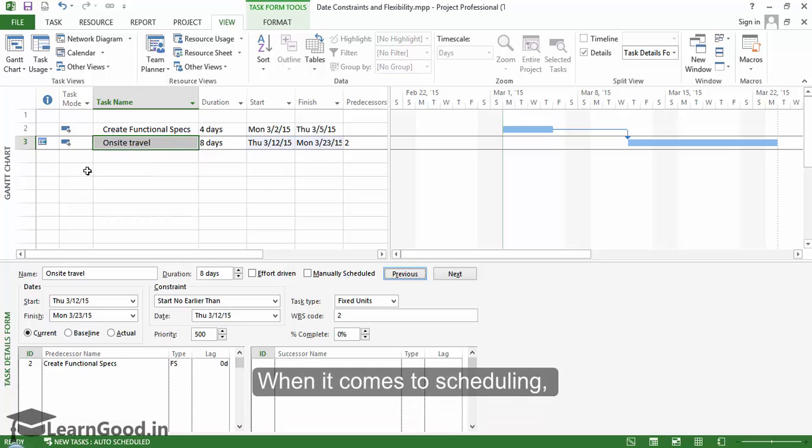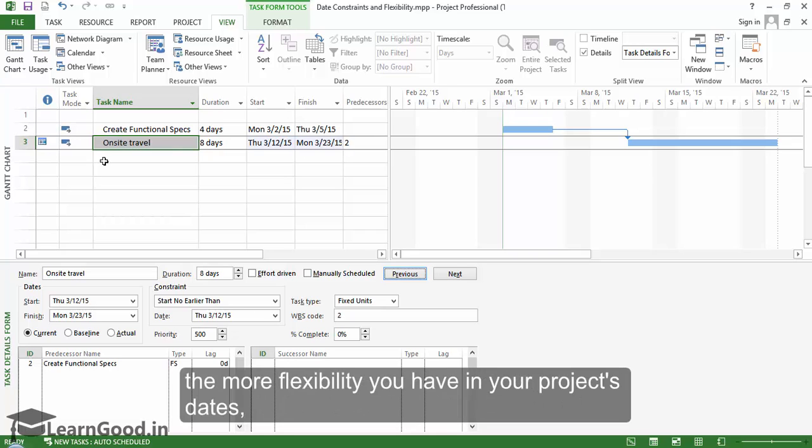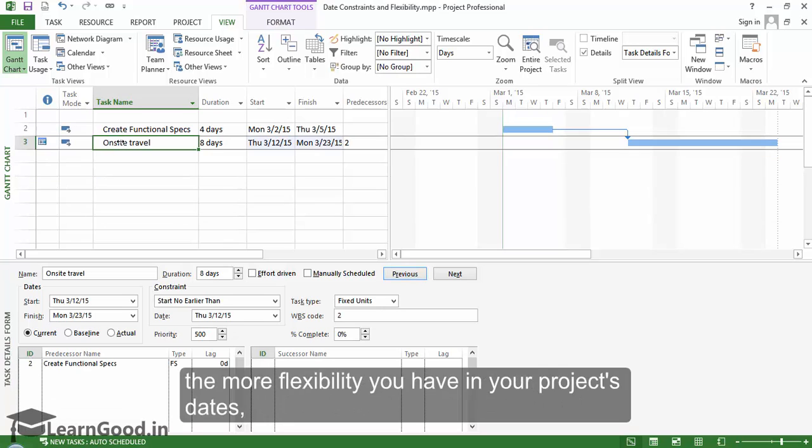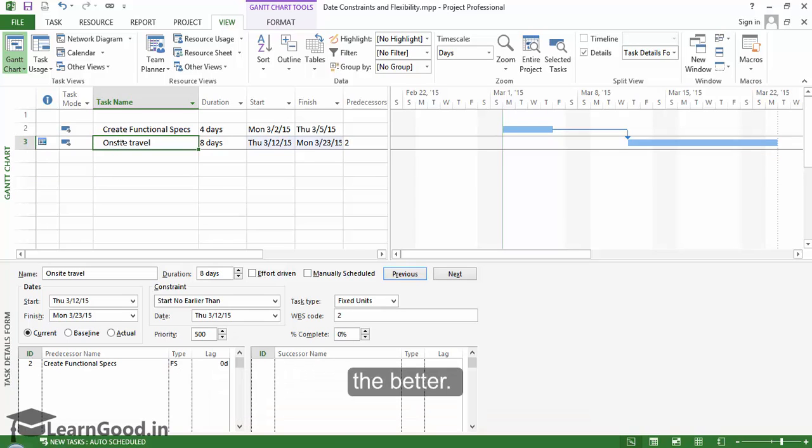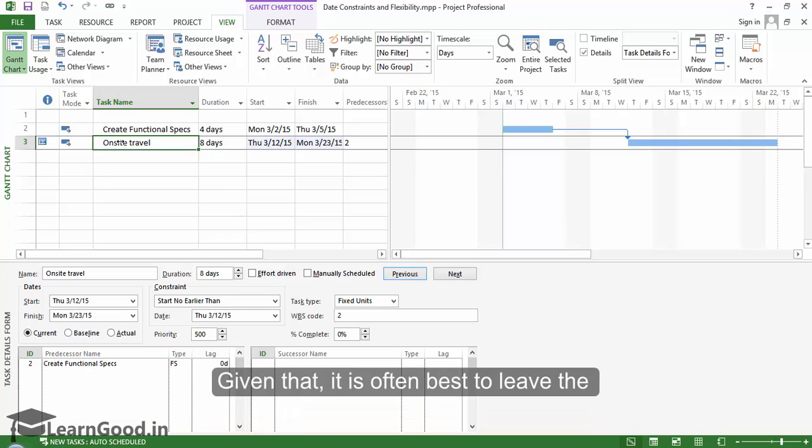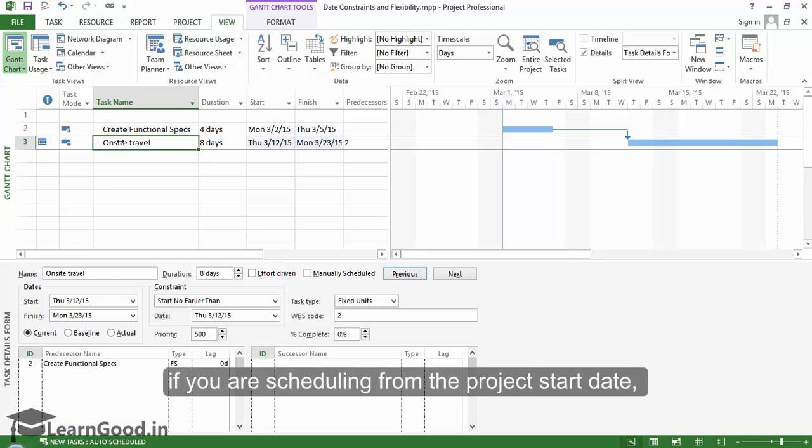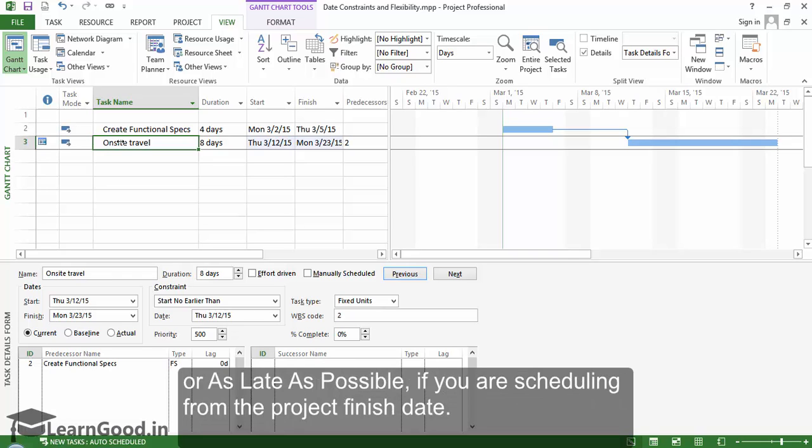When it comes to scheduling, the more flexibility you have in your project's dates, the better. Given that, it is often best to leave the constraints set to as soon as possible if you are scheduling from the project start, or as late as possible if you are scheduling from the project finish date.